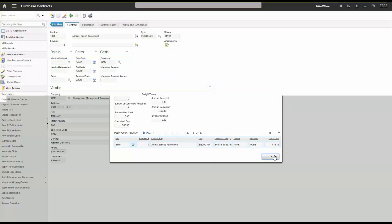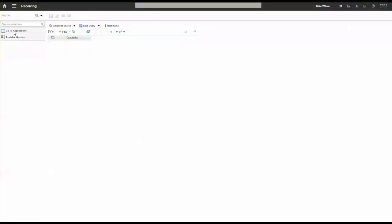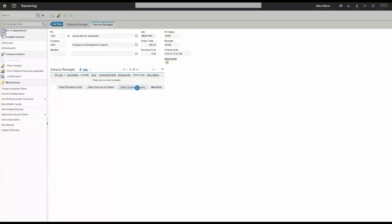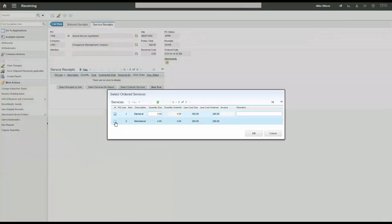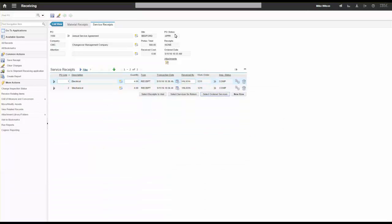The planner can create that release and send PO 1100 out to CMC to come do the work on work order 1211. Rather than entering time, we're going to receive those services. Going to the receiving application, I select PO 1100, go to service receipts, and select my ordered services. My approved PO was for four hours each. I can put remarks in, for example noting who did the work. I'm going to receive four hours for each line. When I click Save, my PO stays approved and my receipts go to complete.